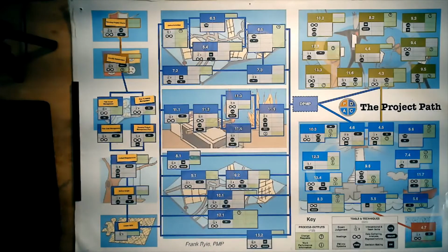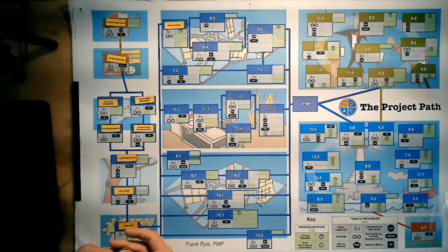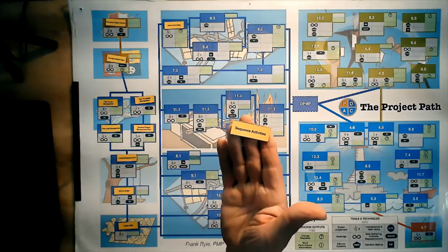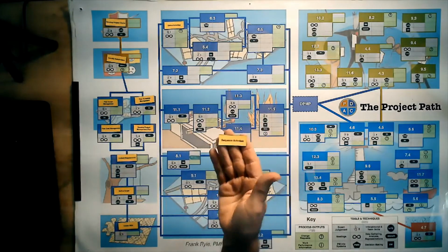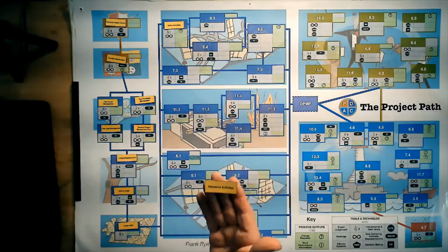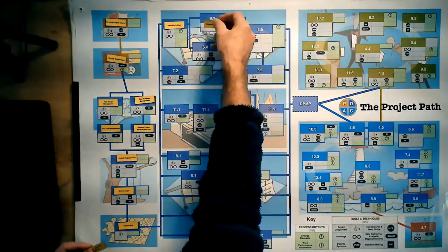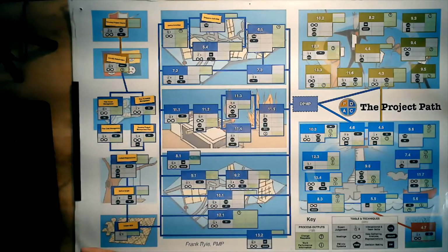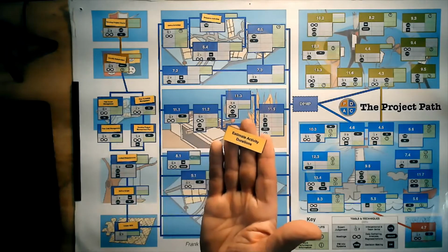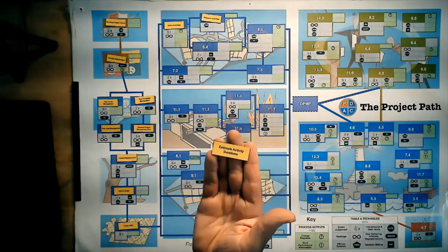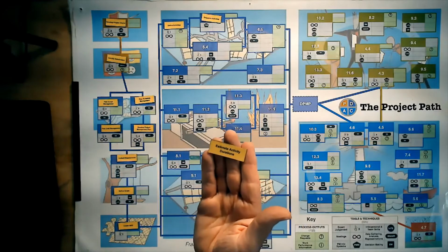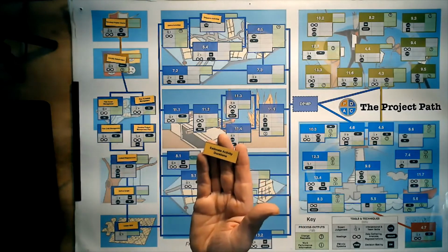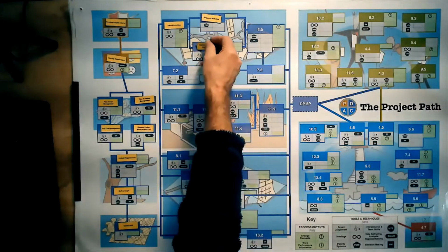Now we can do two things with those activities. And the first one, for our purposes, is to sequence the activities. And we say this before this, or this in parallel with this. And so we will put leads and lags perhaps, and we'll represent that in some kind of a network diagram. And then we estimate the activity durations. If you remember, durations is not the same as effort. And therefore we look at analogous, parametric, bottom up, and 3-point estimating, but they will go there.